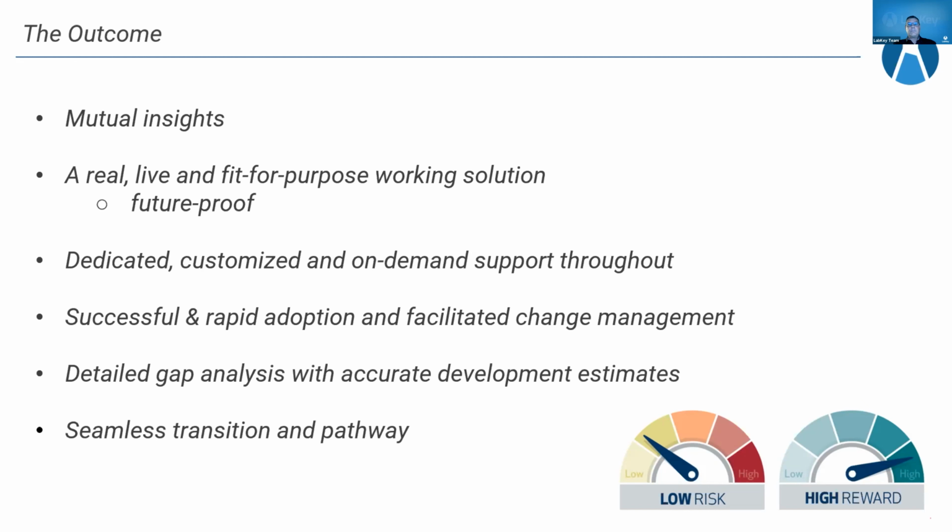So as part of the SDE, we also produce a gap analysis for any technical requirements or unmet needs that may require additional software development. The report will include details on the level of effort needed to close those gaps, both in terms of cost and a predicted timeline as well, for transparency.